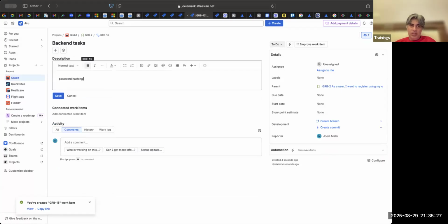Why am I doing this? Because sometimes teams will avoid doing tasking. In those cases, you are not getting into the details. So the fewer details you know, the more difficult it is to do the estimations. And if you don't have very many details, then you can do a high level estimation. That high level estimation is where you use t-shirt sizing rather than planning poker.